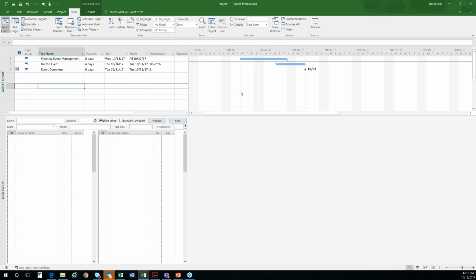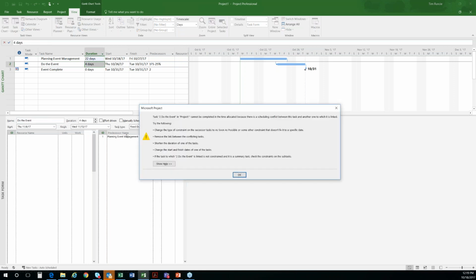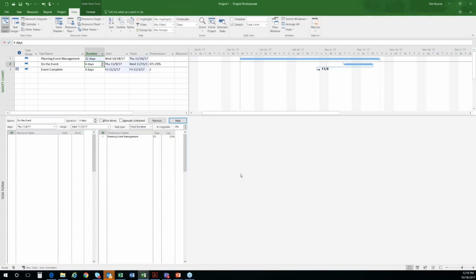The problem is that in a dynamic scheduler, anytime we hard code dates, if, for example, planning goes from 8 days to 22 days, you get these messages that pop up, says can't do it, scheduling conflict, and when you click on OK, because you don't have any other buttons to click on, it moves your schedule out, but what didn't move? That milestone, still locked in place. So everyone else who's downstream from your planning event is thinking you're going to be on time. Or if this is a key critical kickoff meeting, the rest of the interconnected master schedules or linked activities, or if you're using Project Online or Project Server and you've got deliverables tied, this isn't going to move.